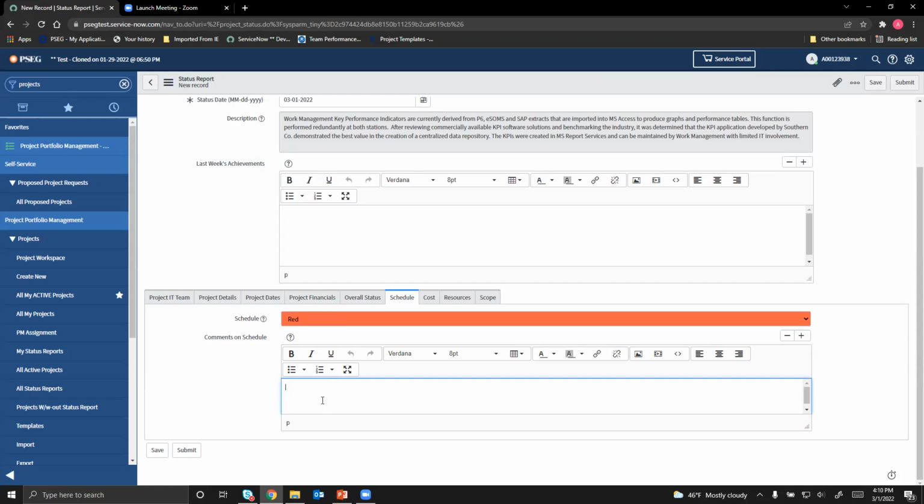We want to know, or actually the leadership wants to know, is there anything they can do to help your project, to expedite your project, or to give you the right funding. So all this information is needed for red projects. Yellow, definitely we need half of this information. We don't need what help you need, but in case you have something that you want to highlight to the leadership, you're most welcome to enter it here.